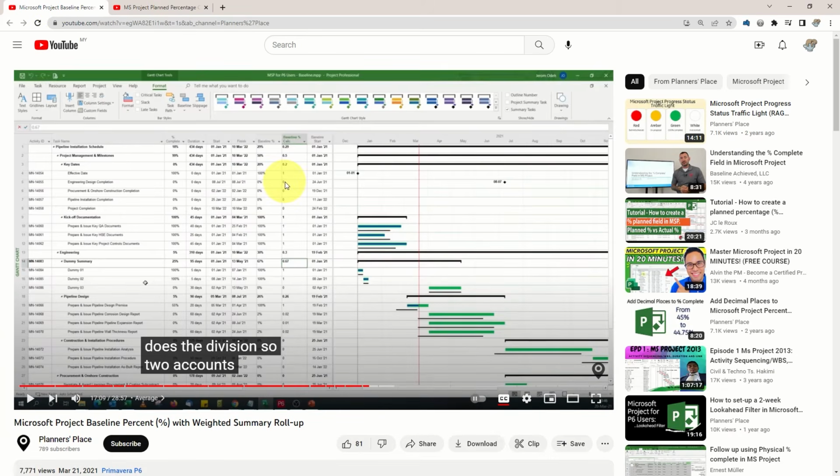They have showcased a very nice formula. But the main problem is that after trying their formula, the summary task level row percentage doesn't seem to tally with the percentage calculated originally by Microsoft Project. The overall summary percentage level is very important. Not seems to be, it's very important for my client. And the difference is around 5-6% or even up to 10% when the project is very large or complex. So let me just show you how they did their formula over here.